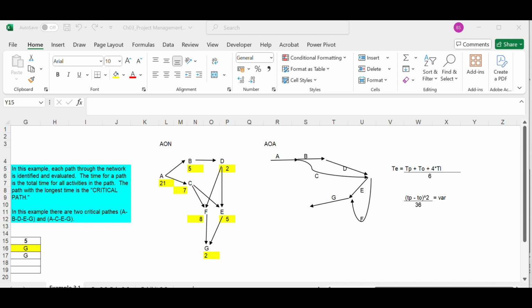Proper risk assessment should be planned and performed. There should be proper responsibility attribution, and we should also consider uncertainties while estimating. Uncertainties may include unexpected meetings, vacation, rework, maybe a change in learning curve, etc. We cannot estimate with 100 percent probability that everything will go right. So the best thing that we can do is estimate with an 80 percent possibility that everything will go right and a 20 percent possibility that things will go wrong. This is better than a 50-50 possibility. There should be a very low margin of error in estimates.